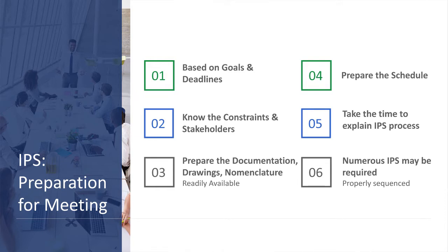Prepare the schedule. We do our best to try to align what the Netpoint file is going to look like before we get in the meeting. We build fragnets and we put them off the side. We'll talk about that in another second here.